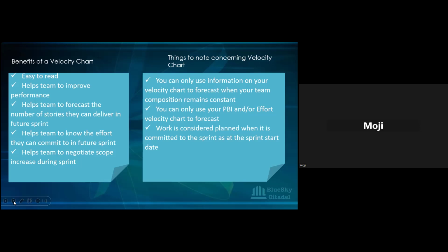So when you know that, for example, the 50 we're using is at full capacity, we can only do 50. So you know that full capacity will do 50, 55 or thereabouts. It's better to take it down than to take it up. So even if it gives you 50, it's better to take in 45, with the hope that you're giving a 5 buffer in case there's any emergency during the sprint.